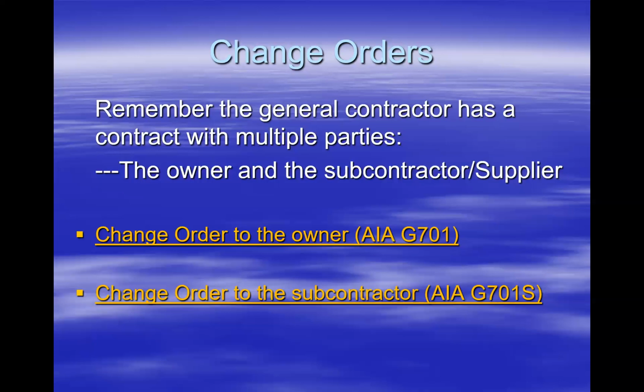In my example, that means we have to go back and generate 5 to 15 subcontract change orders, or however many that's going to affect us from that prime contract.